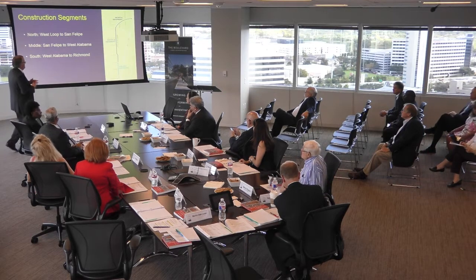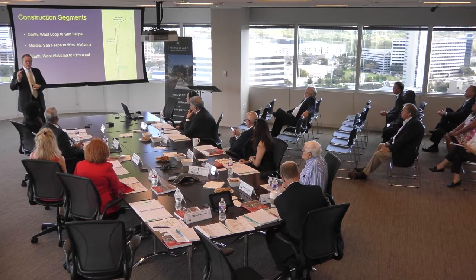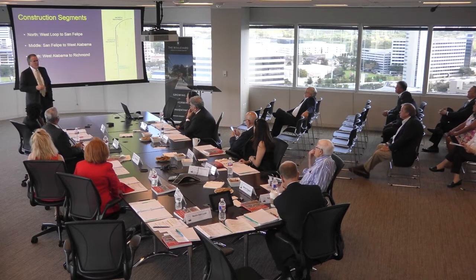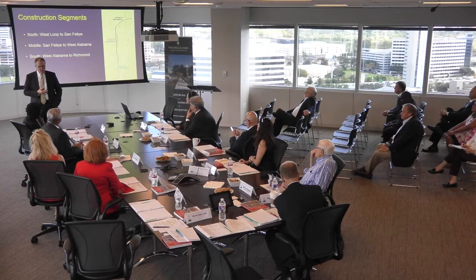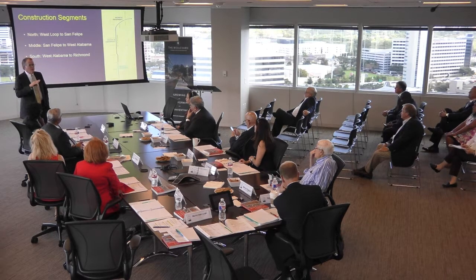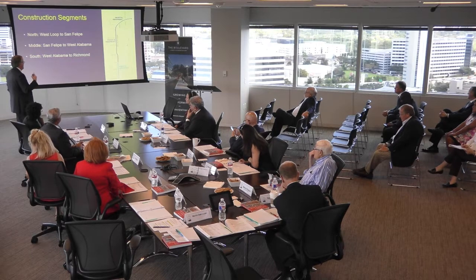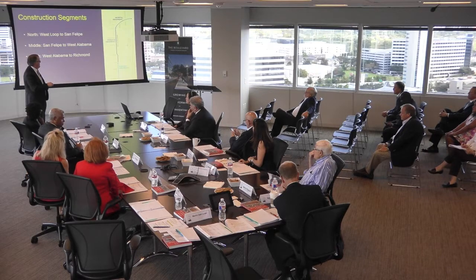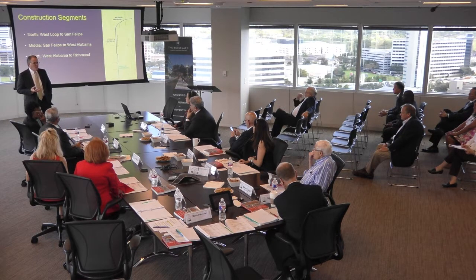We have really thought over the last few years that we'd build this in 3 segments. Obviously, the first segment is north of San Felipe, and we'll talk about its particular schedule here in just a moment. Then we would be building 2 more segments south of San Felipe. Robert is beginning to fully consider the idea of bidding everything south of San Felipe as one bid, to make coordination a little bit better and easier.